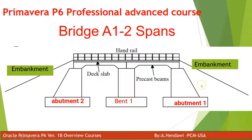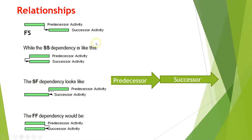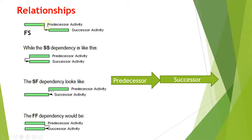Before going into the details, let's define relationships. In P6 you have four relationship types: finish to start, start to start, start to finish, and finish to finish. You also have two key terms: predecessor and successor. Finish to start means the successor activity will start after the predecessor activity is completed.